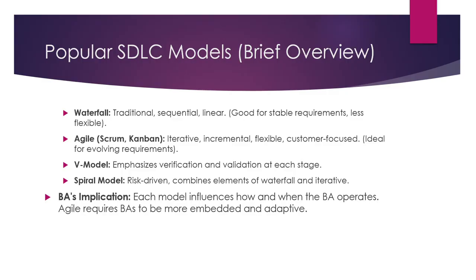product or the software. If your requirement is frozen and is not going to change in the future, then using the waterfall methodology is better. But if your requirement is not frozen and requirements continuously come from the business, and they don't know what they want to build but have some ideas, then we use the minimum viable product concept, MVP.